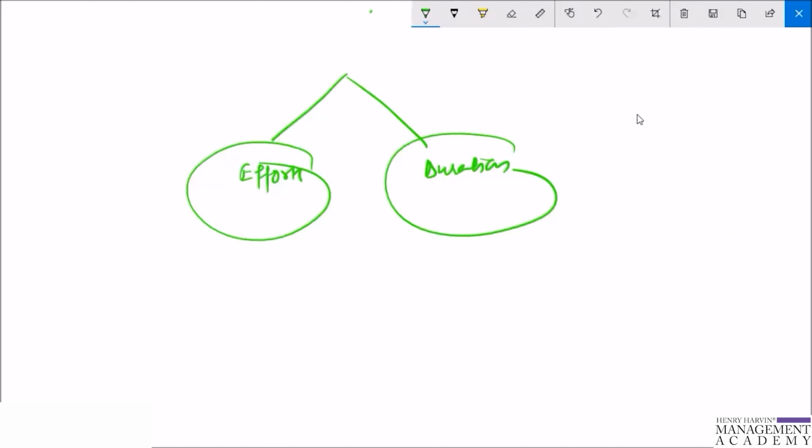Especially if there are many items to be estimated, as can happen at the start of a new project, the best way is to split the larger team into smaller teams, each of which must have at least 3 estimators. It is important that each team member estimates consistently. So when your team calls something 3 story points, it is better to be consistent, so that what your team calls 3 story points is the same for both teams.